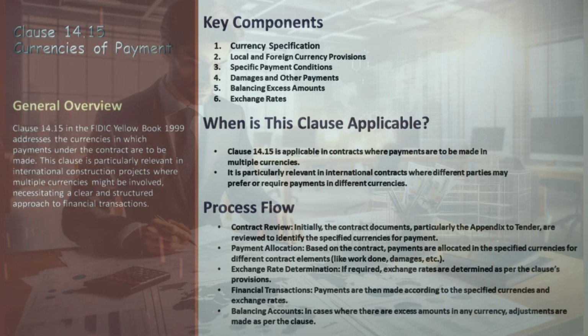Clause 14.15 addresses the essential aspect of currencies in payments under contracts. This is especially pivotal in international projects where dealing with different currencies is the norm. Let's break down this clause to understand its impact on financial transactions. Firstly, the clause specifies the currency or currencies for payment, as named in the appendix to tender. This is a critical step for setting clear financial expectations right from the start.